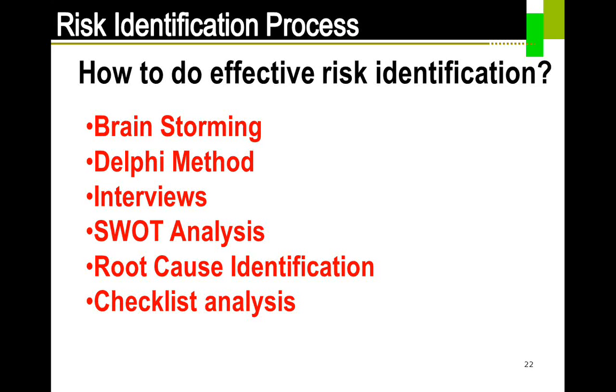However, with checklist analysis, I do have my personal checklist which goes for more than 150 different things when it comes to IT projects. It looks at different scenarios, what can go wrong in a typical IT project, and then you can say whether this is applicable to your project or not. If you say yes, then obviously you need to see why it is yes, and what the different ways are that you can manage those risks.